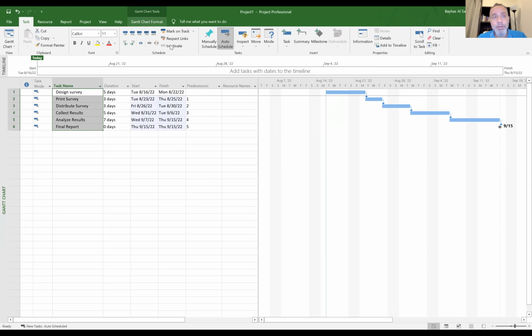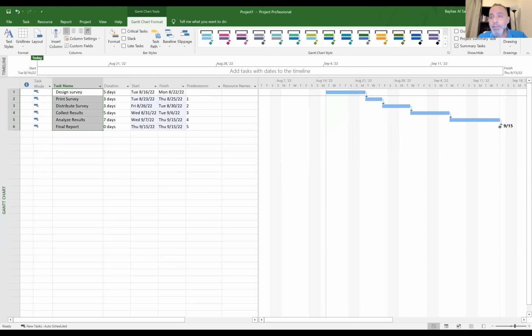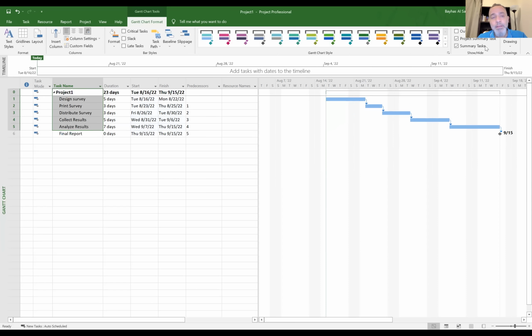And if I go here and make a summary of the project, if we consider this a complete project, okay, you find now that all of these tasks will take 23 days, starting from this date and ending on this date, by using this sequence. Okay, any questions so far? So we identified the activities, we sequenced the activities, and we estimated the activities' duration, okay?